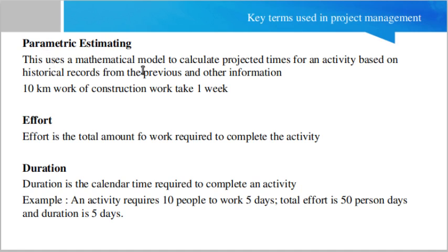Next is Parametric Estimating. This uses a mathematical model to calculate projected times for an activity based on historical records and other information. For example, if 10 kilometers of construction work takes one week, then 20 kilometers of construction work will take two weeks. This is an example of parametric estimation.